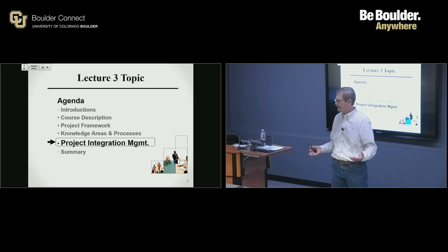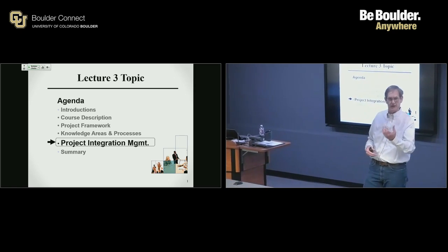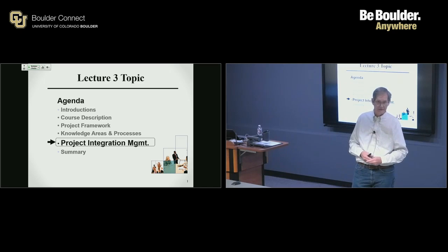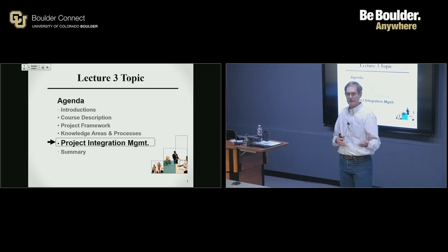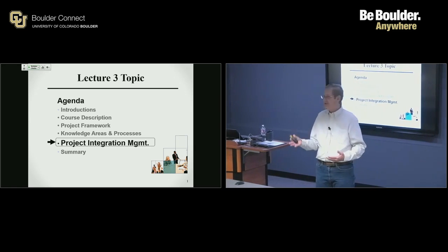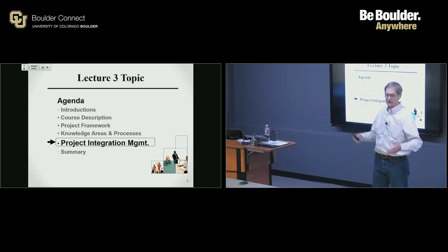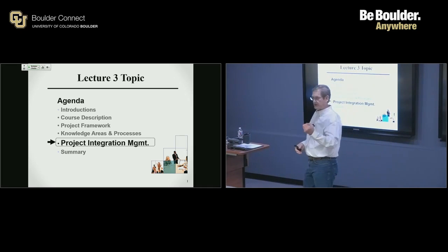Do you have to use all of the 5 process groups on a project? Not really. Maybe you're just called in to initiate a new project. Maybe you're doing concept phase for the new satellite program. What are they calling it? CubeSat, right? So maybe you're just called in to do some concept reviews, initial design reviews, things like that. So projects are broken into phases. And so much of that is wrapped around those 5 process groups: initiating, planning, executing, controlling, and closing.